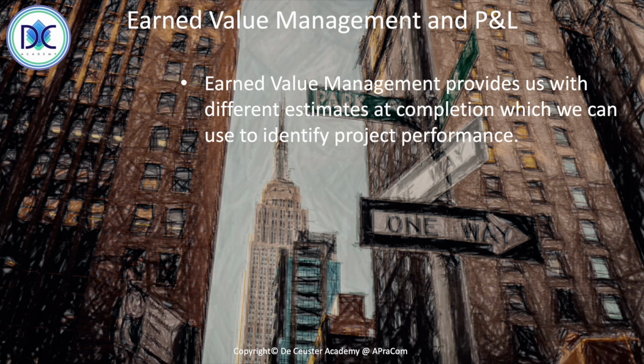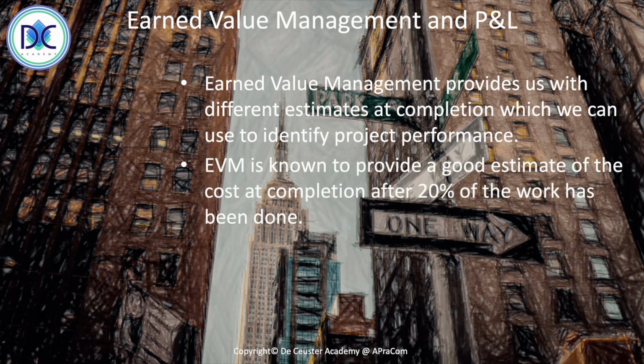And project performance with earned value management has a reputation or has an experience that a very good estimate can be made after completing 20% of the work. It means very early in the project we can already have a very good estimation of what's going to happen in the future. And that's very valuable because it allows us to, in fact, kill a project when it's necessary.